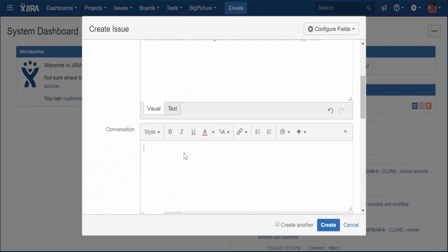Conversation is the second of the 3Cs. This description box is where you will register all the items that are pending for discussion with the product owner. Simple sentences are enough. For instance, it's mandatory to request permission to send SMS related with the account maintenance. This attribute will tend to be empty, since as questions start to be answered, they will pass to the acceptance criteria attribute.